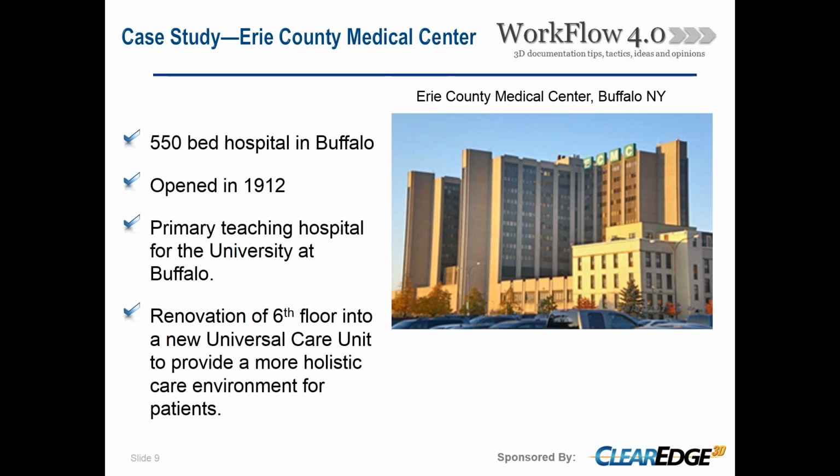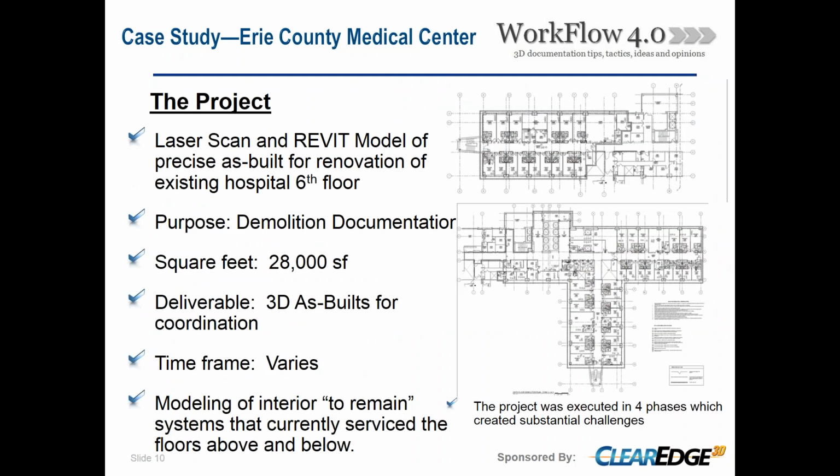So this particular project, we were able to scan after demolition. We were provided a Revit model from the architect, and this model was what we were to use for the background of our coordination. The problem was the demo hadn't been done, so none of the MEPs above the ceiling had been recorded. And because this was a floor in the middle of the hospital, we needed to know what was there that needed to be remaining.